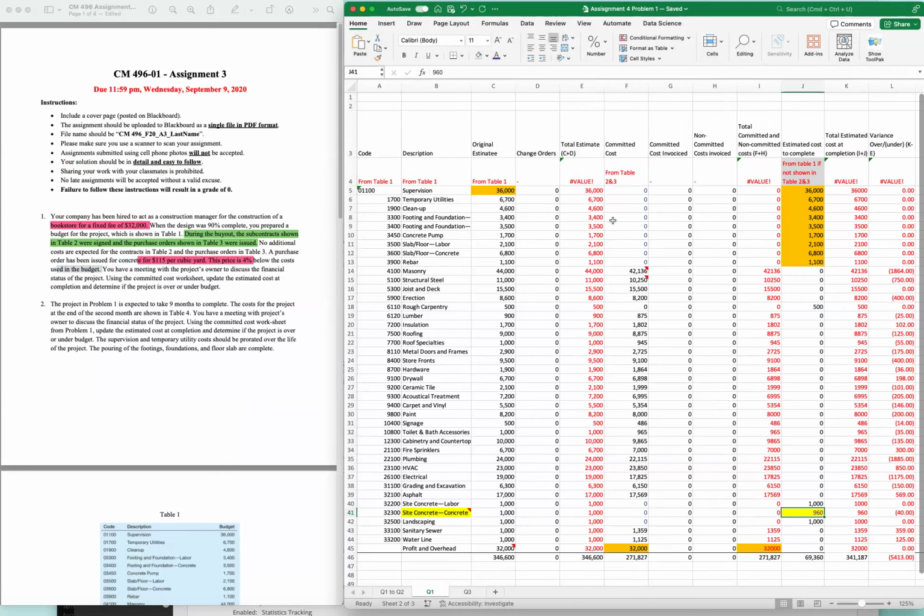So this number will be 4% below. That will be the original 1,000 times 4% below, which is 1 minus 4%. So basically it will be 96 percent, right? So the number will go to 960.